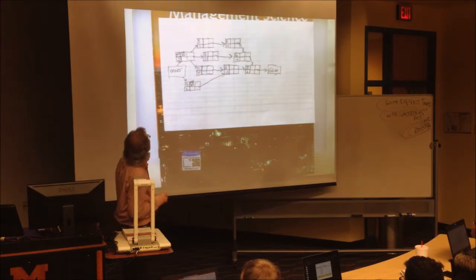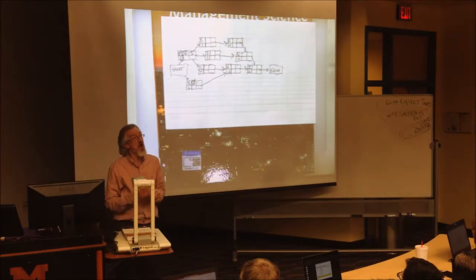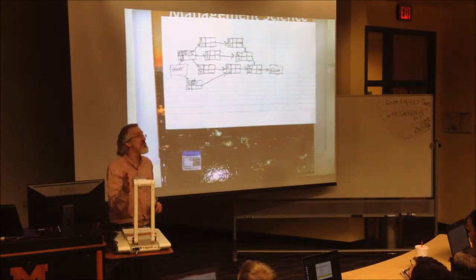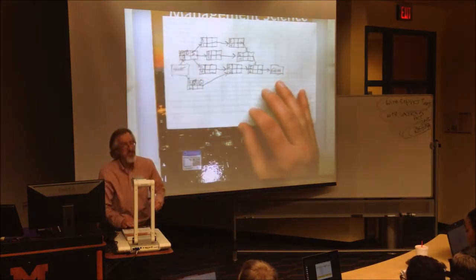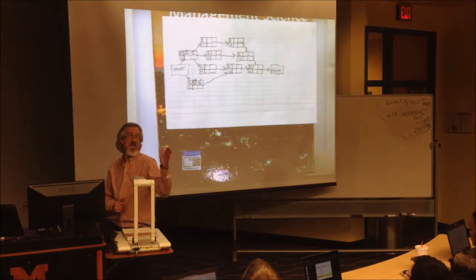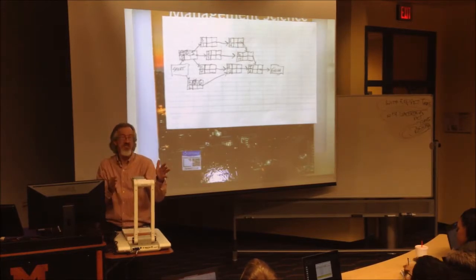Scott, 0 plus 5. A should be done on day 5. If this is days, it should be done on day 5. B should be done on day what? 6. The earliest B should start at 0, and the earliest A should start at 0, so they should be done on 5 and 6. A at 5, B at 6.